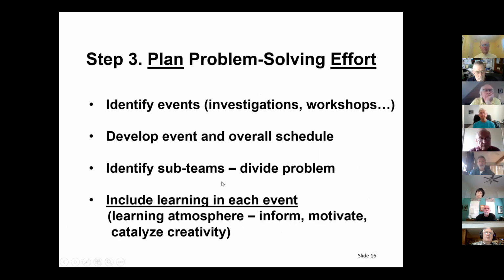Okay, and then step 3 was to identify these events. In other words, this is now starting to actually plan the effort. If we need events, investigations, whatever it is, working up an overall schedule. Again, this is the project management type of planning, identifying what sub-teams we are going to need based on how this problem diagram has shaken out, how we've divided the problem up.